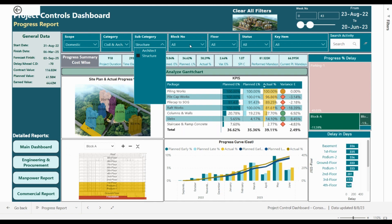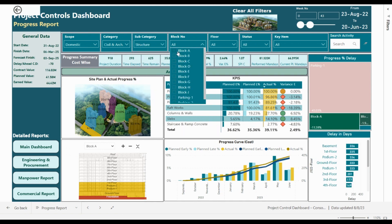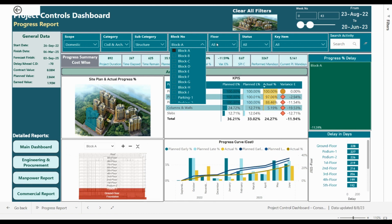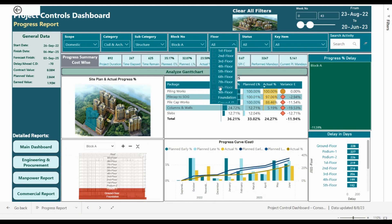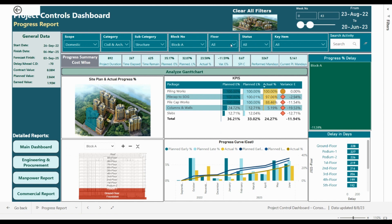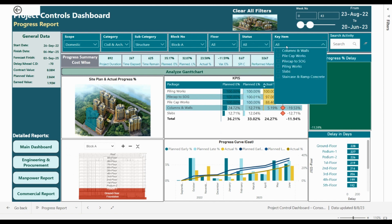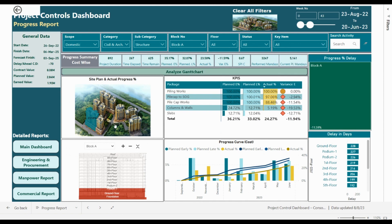We can also filter based on the categories, such as civil and architecture work subcategories. We will take the structure, then analyze Block A. We can analyze any of the floors from the foundation up to the ninth floor, and filter activities that are started, completed, not started, or filter specific activities. This is Block A — we have a delay in the structure works. To clear all the filters, click here and all filters will be cleared.